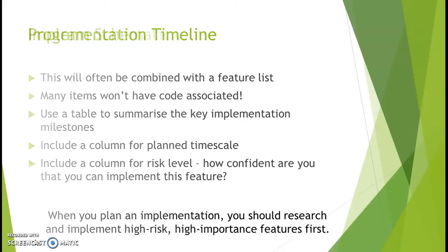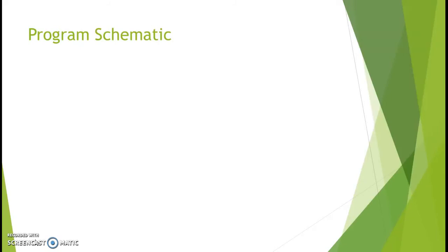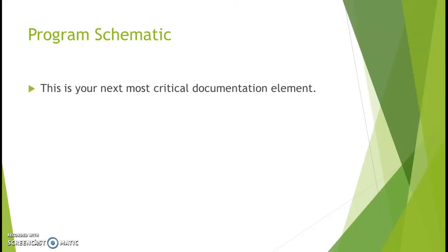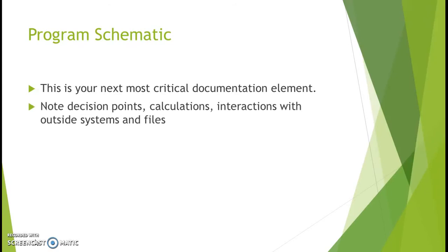Okay, a schematic. A different kind of flowchart. This is your second most critical documentation element after that set of milestones. You need to look at your decision points, your calculations, your interactions with outside systems and files, and put those into flowchart form.